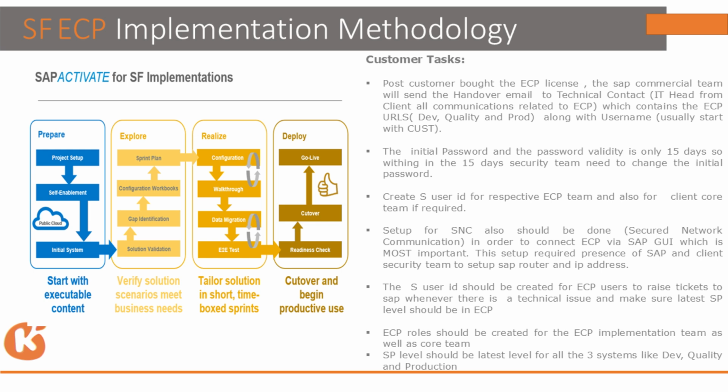Whenever we want to set up SNC, secure network communication, it is a combination of the SAP team as well as the client security team. Yeah, nothing from our side, as a consultant? No, at consultant level, you need not worry about that. The only thing is you have to send reminders to the client saying that without SNC we cannot start implementation. Okay. That way it will be good, because we have seen many implementations where it took almost 2 months to set up, because of lack of knowledge about how to contact and how to get it done. So we have to clearly inform that SNC setup can be done with the help of SAP. You have to raise it to SAP, saying that we need to do the SNC setting.